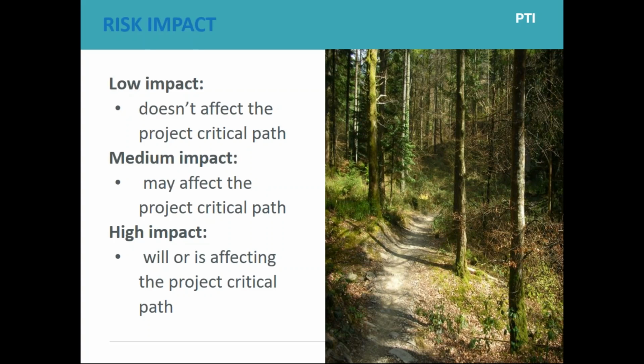So one of the things that often worries us in clinical trials is patient recruitment. And patient recruitment will have a high impact on your clinical trial. How do you mitigate for that? Well, the usual way of mitigating it is to bring on new countries or new sites. So what does that mean when you're outsourcing? Can your CRO go to those countries? Is the first thing.